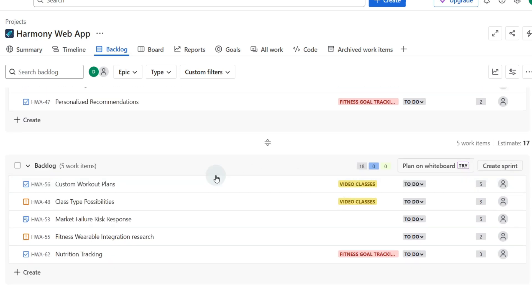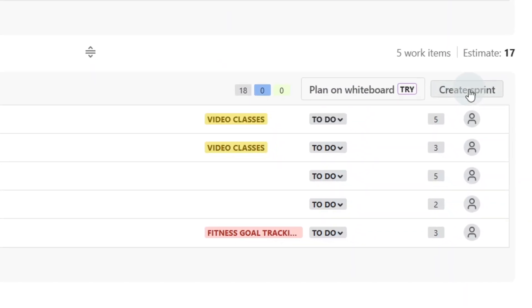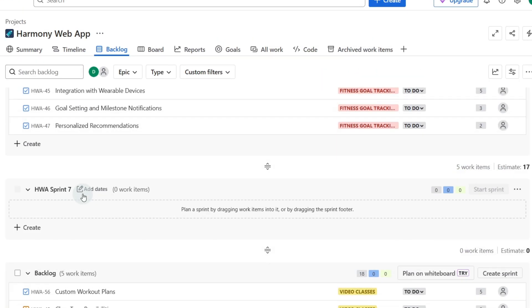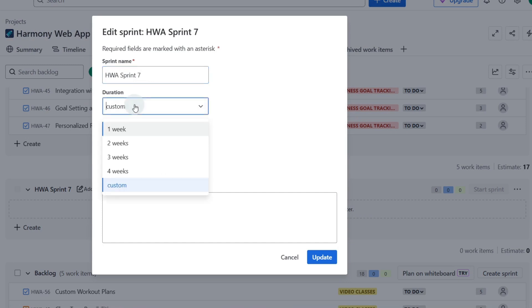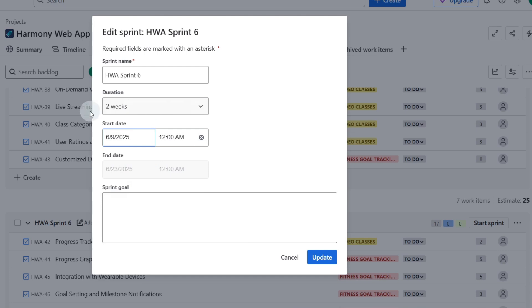So if we click create a sprint, as you can see we've got sprints one through seven currently. To edit this sprint we can add the dates over here and we can make it a custom duration or a two week duration. If we select two weeks and click on the start date then it will automatically give us our end date.